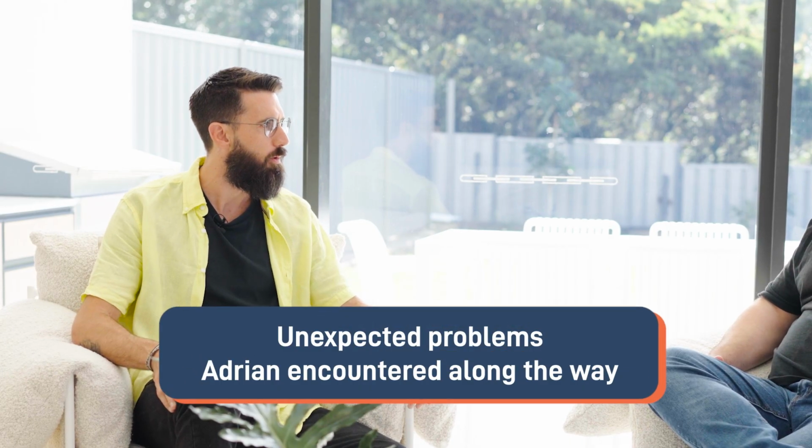I know this one was pretty smooth sailing because you did the legwork up front, but were there any curveballs that you were surprised at that came your way? Yeah, there were still a few things that popped up. The one that stuck out was we demoed the site, went to set out the slab and start forming up the slab, and we realised that there was an issue with one of the side boundaries. The slab was actually closer to the boundary than what it should be. So generally when you're building a duplex, you're maximising your permissible width. You've generally got a fixed distance off the boundary. Very simple, just getting a tape measure out and measuring it.